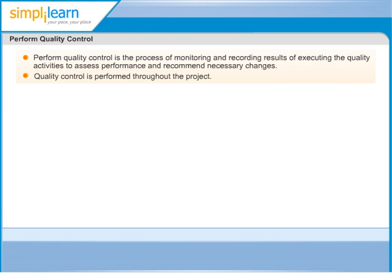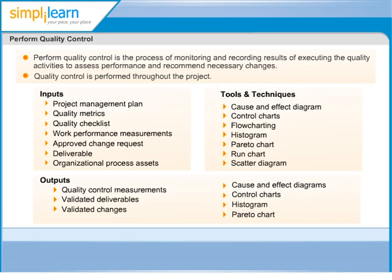Quality Control is done throughout the project. The project deliverables are inspected against the planned checklists. The Quality Metrics measurements are continuously done to see whether the project quality is improving or not. Quality Control activities result in recommended changes, corrective and preventive actions, and defect repair to the integrated change control process.